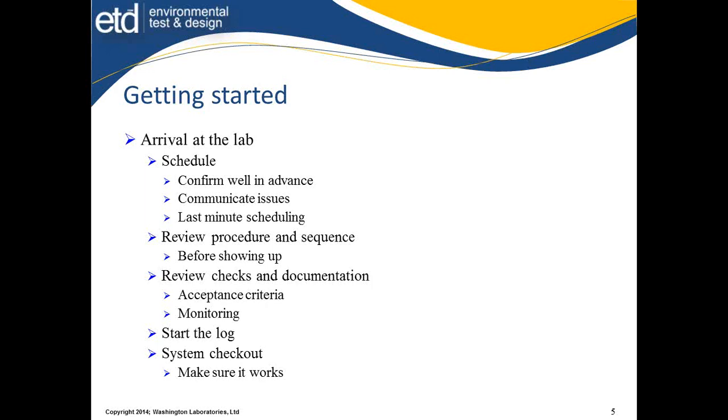Communicate. We need to get a good line of communication with the scheduling activity. Be very adept at communicating, talking with people. Sometimes the email path works well, sometimes you just need to pick up the phone. And of course, last minute scheduling and slips are going to happen. The test program is usually pushed to the last minute, and you're supposed to make up all of the lost time that happened throughout the development process. So the last minute changes are always occurring.